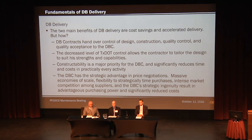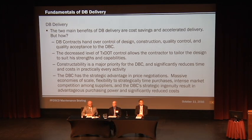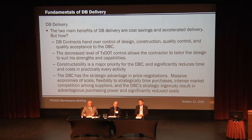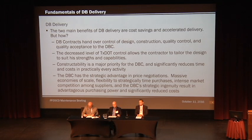DB delivery has two main benefits: cost savings and accelerated delivery. In the first bullet, there's a risk shift, which is basically the whole concept of DB. We're putting the control of the design, the construction, the quality control, the material acceptance — all of that — onto the developer. This leads to a decreased level of oversight by TxDOT; we go into more of an OVT, an over-verification role. This allows the contractor to tailor his design and construction and stage everything to best fit his methods. The DBC also has an advantage in price negotiations — he's in control of the design, construction, and schedule, which allows him to take advantage of timing of purchases and market competition among suppliers.